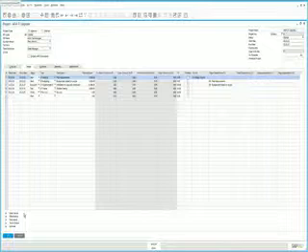So for the particular stage that we have highlighted, if we open up the open issues phase, we can see that there are 2 open issues relating to this particular stage that need to be solved before we can move on to the installation phase. As our project management capabilities are linked and integrated with our service module, we also have the ability, for example, to look at a solution for any open issues.